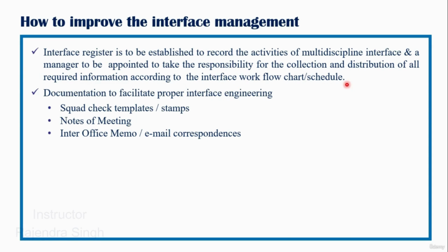So either the project control team or project manager or project engineer has to maintain a log or a register of interface, wherein whatever documents are being received, and an SLA has to be ensured that within a proper timeline the input has been shared by all relevant stakeholders so as to enable the department to prepare the document without any fault, ensuring the integrity and schedule are maintained for that particular deliverable.